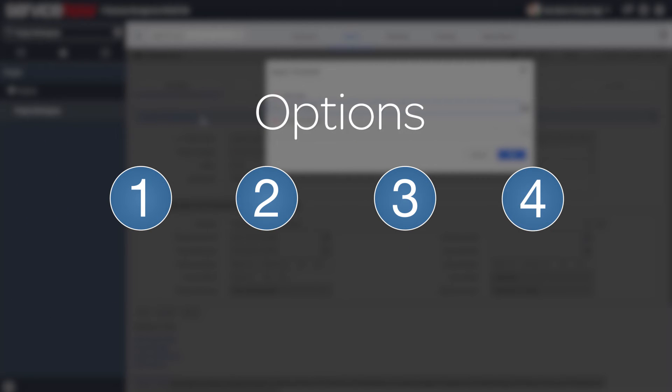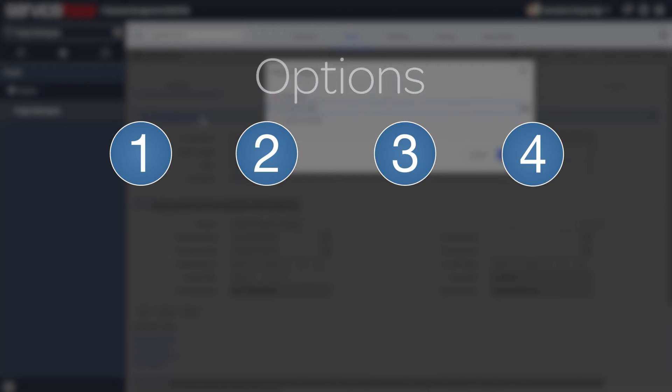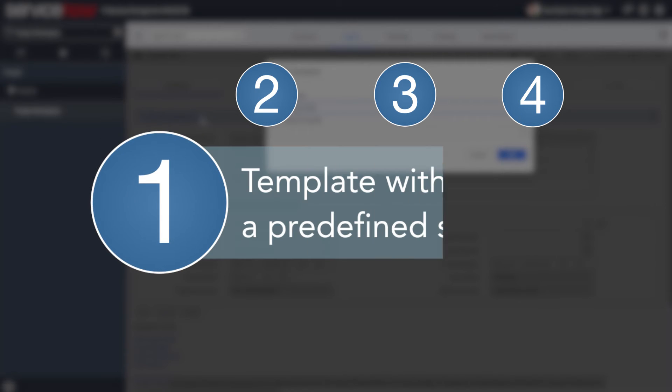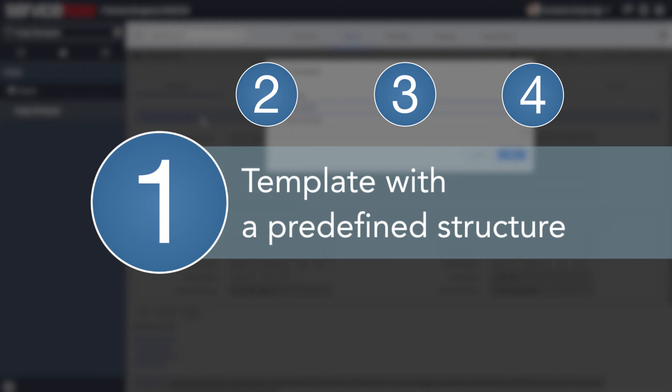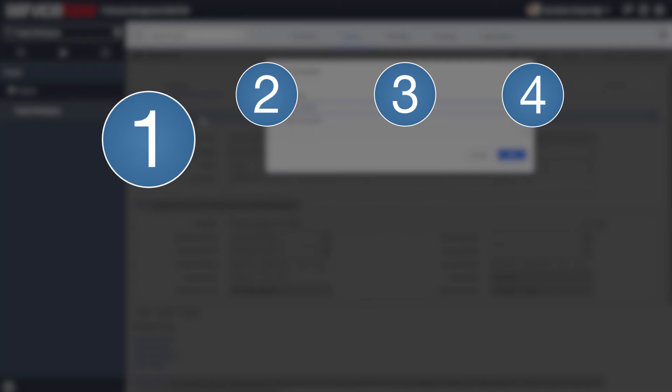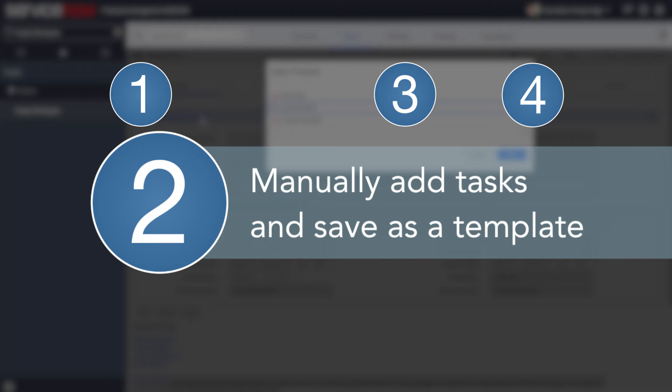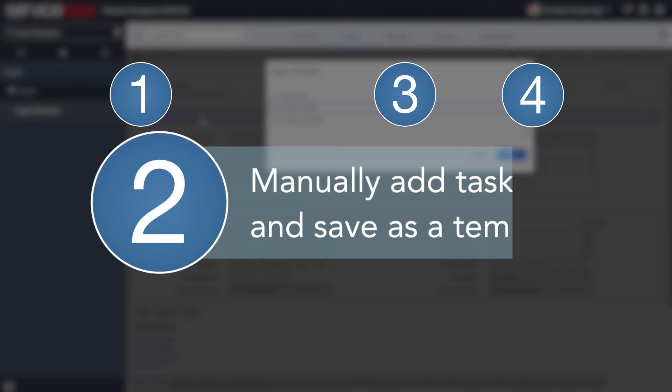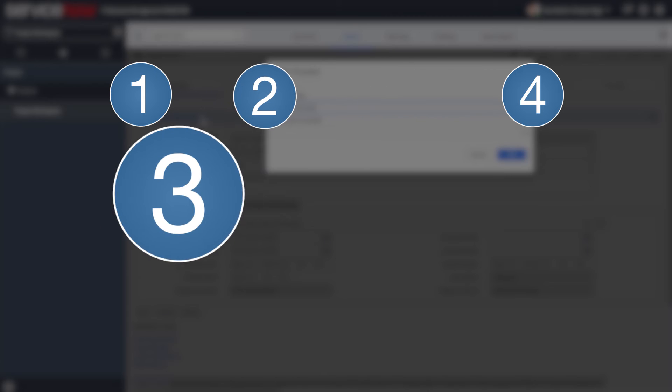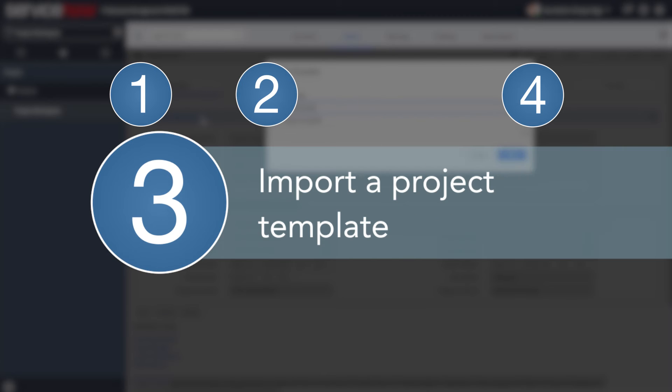You have four options to use and manage project templates. Option 1: Choose from project templates included with the project management application. Option 2: Create a new project template by adding project tasks, and then save the project as a new template that can be applied to future projects.